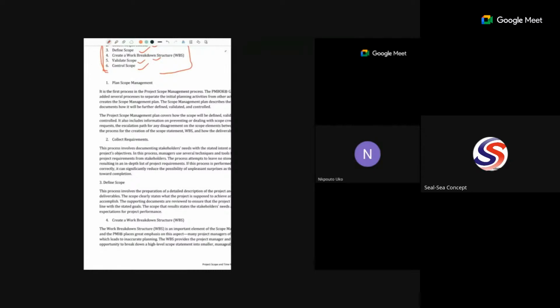And then the electrical department will be after how the project will benefit them according to the electrical work that they do or offer in the company. When you want to start that project, you really want to go by saying, what are your requirements? Requirements means, what are your expectations? So electrical might say, please, when you are building these things, we would like the electric motor you will install to be 50 kilowatts.